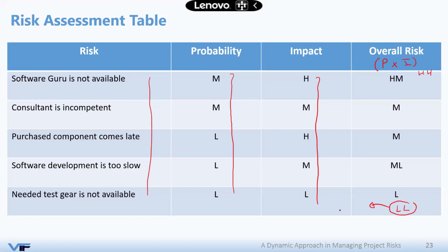Why do they call it watch list? Because it includes only low priority risks, low probability, low impact risks, and we refer to it as a watch list because we are going to watch it. If the probability and impact of these risks change, increase, then we move them again to the risk register. Why do we do that? Because we don't want to waste our time monitoring hundreds and thousands of risks on the risk register.